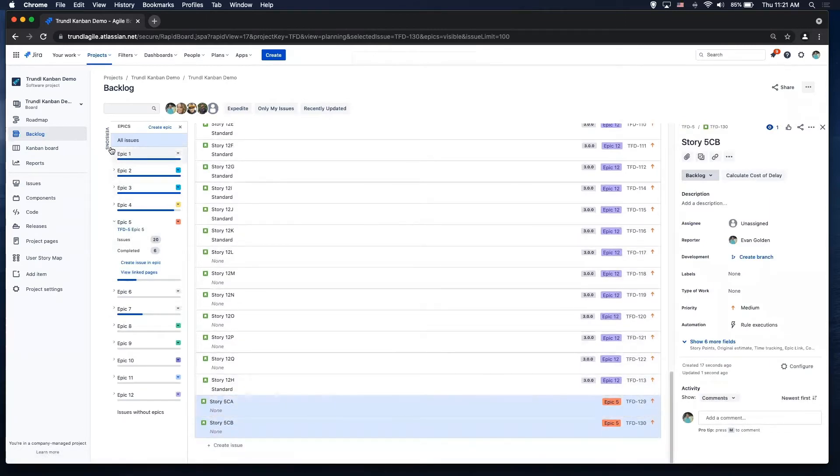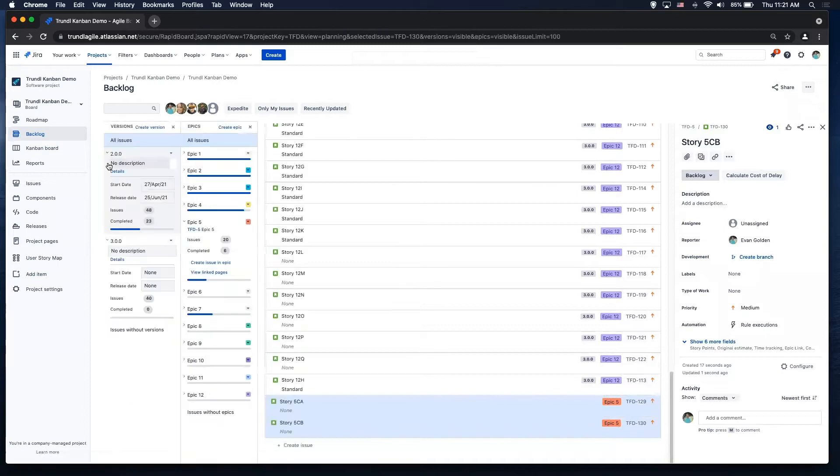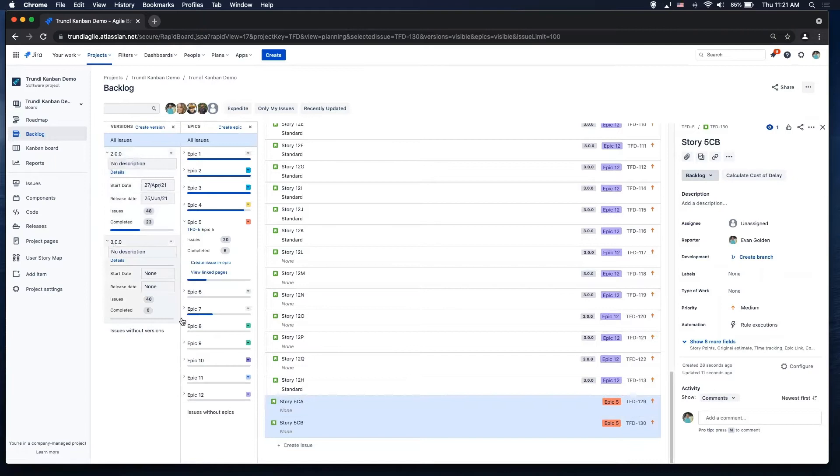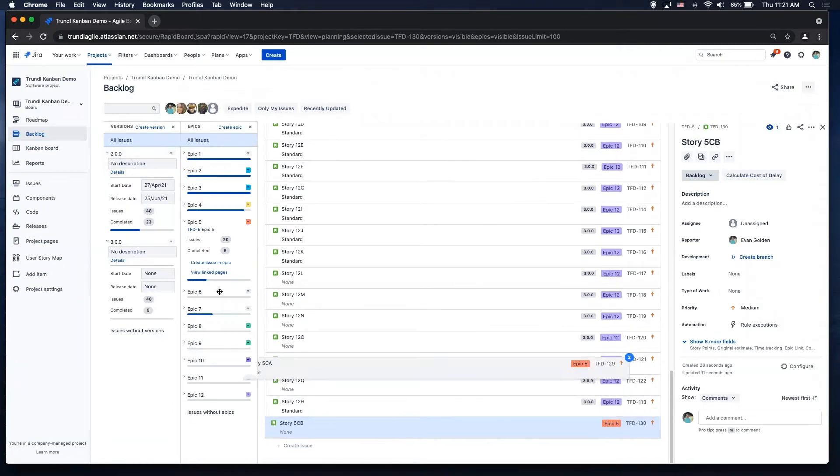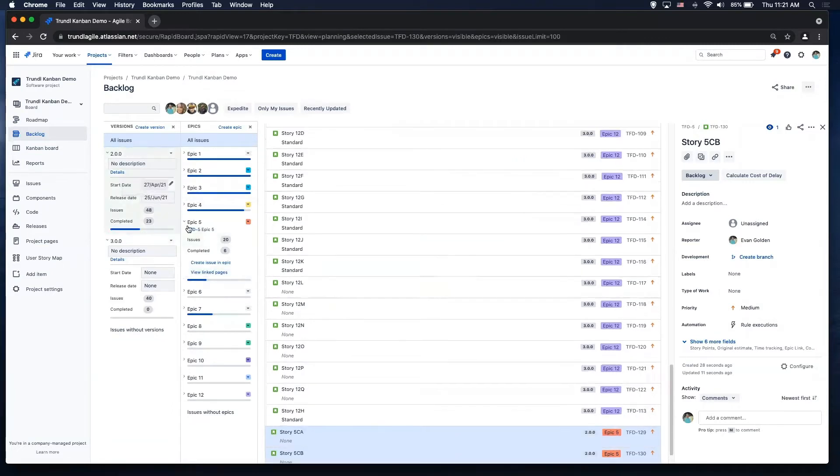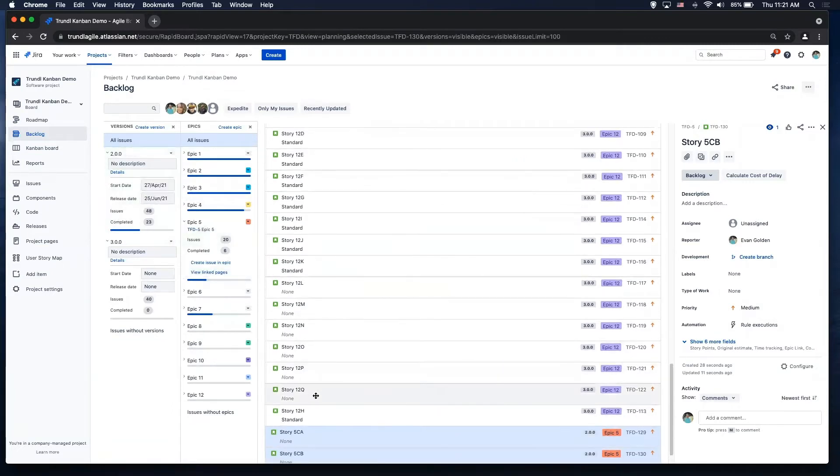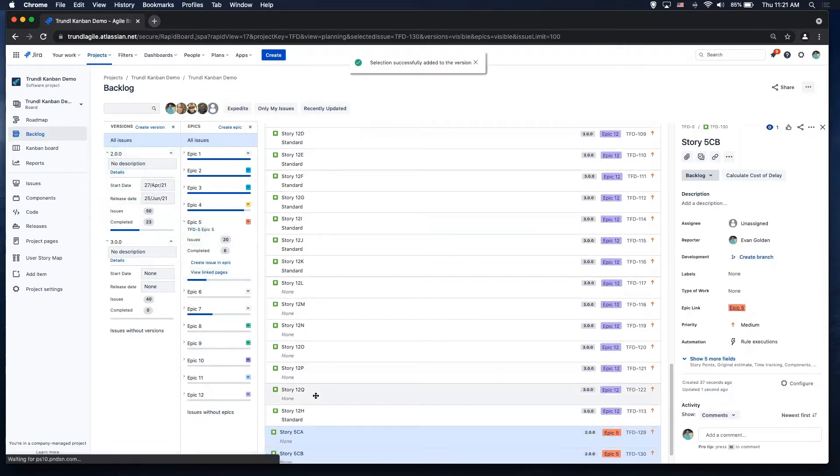I also have a version panel so I can leverage my releases, which in JIRA is that fixed version field. So you'll see I have release two and release three here. Release two has 48 issues, 23 are completed with start and end date. So I'm going to go ahead and grab those issues and throw them into release two. So easy drag and drop stuff. I'll collapse these.